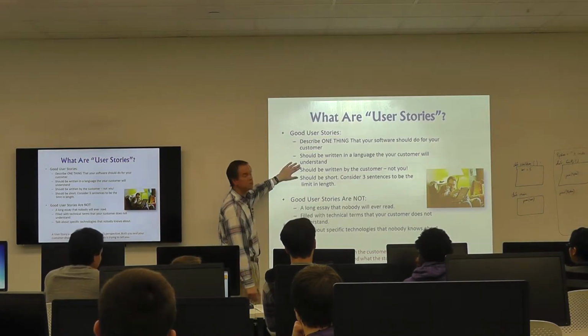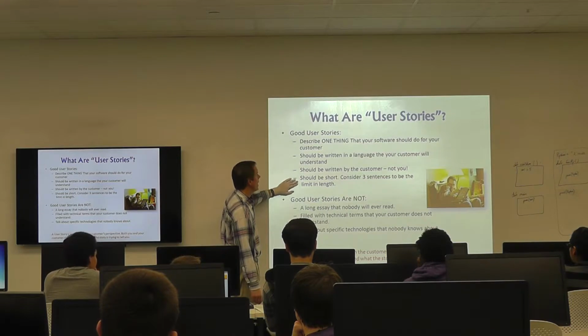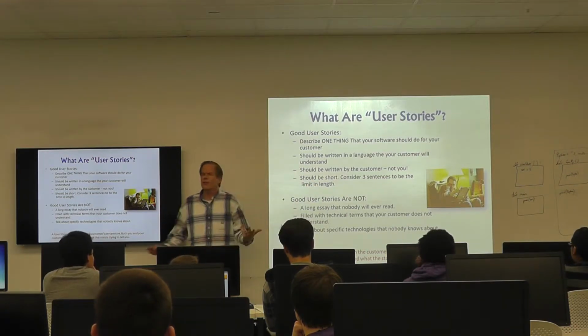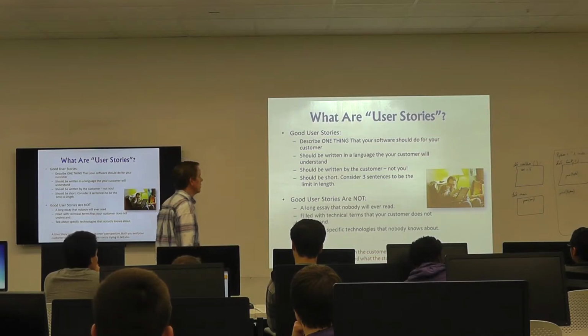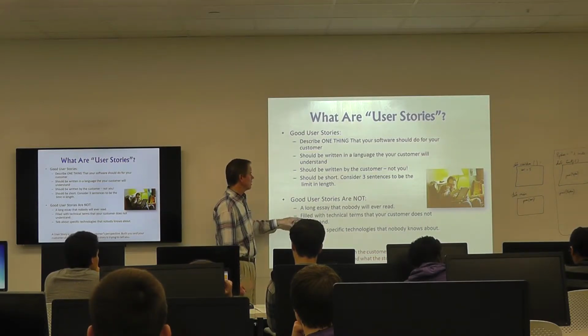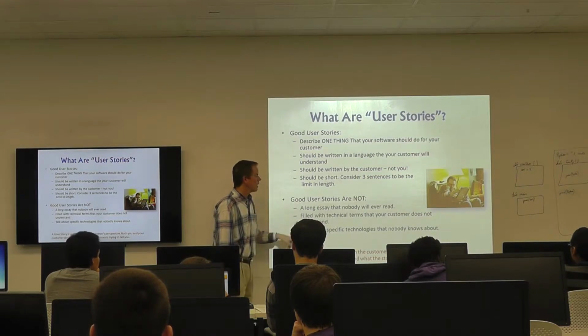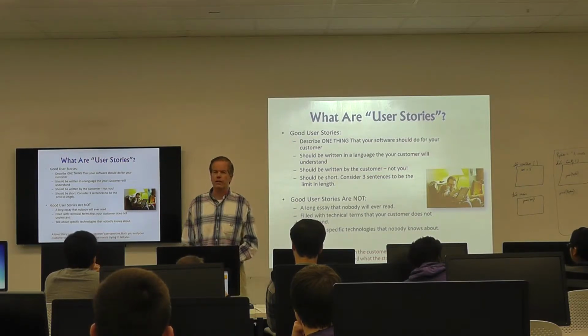Okay, should be written by the customer, not you. Yeah, because they like their language. And it should be short. No more than like 3 sentences. We're not going for anything long here. Tell me what you want and do it concisely. Good user stories are not very long. They're not filled with a lot of technical terms. And they don't talk about specific technology that nobody has any freaking clue about. Okay?